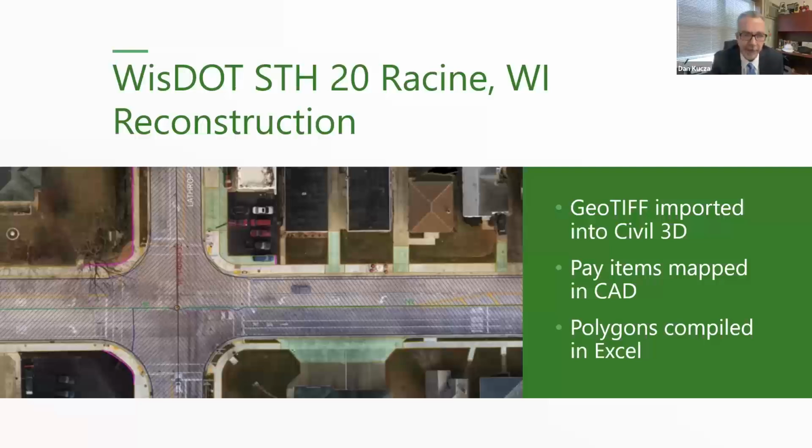It's to scale, right? So then I could have a CAD technician go in there and measure the polygons: the shape of the driveways versus the shapes of the pavement versus the shapes of the sidewalk. Those are all different pay items, and it's kind of like a puzzle. So it's easier to measure when you're looking at it from a bird's eye view as one thing. Next slide.